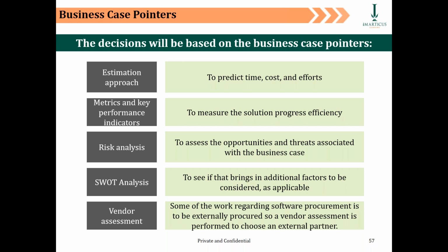After analyzing that, the estimation approach that you took to estimate each requirement, you cumulate all that effort and multiply it with the dollar rate of the labor cost, and you come to a cost perspective for the project. That was the labor cost. The non-labor cost included all the capital expenditures and all the operating expenditures. So you mixed all that together and gave the overall costing part.